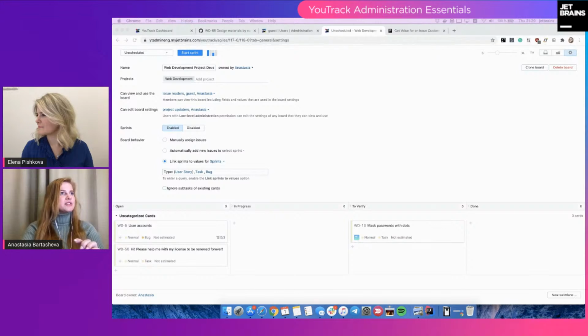One more question is about how I can input the task progress in the task and have it computed in the Burndown. The task progress can be calculated using workflows based on your estimation and spent time values, or based on the original estimation and current estimation values. That is more correct, talking about Scrum terms.